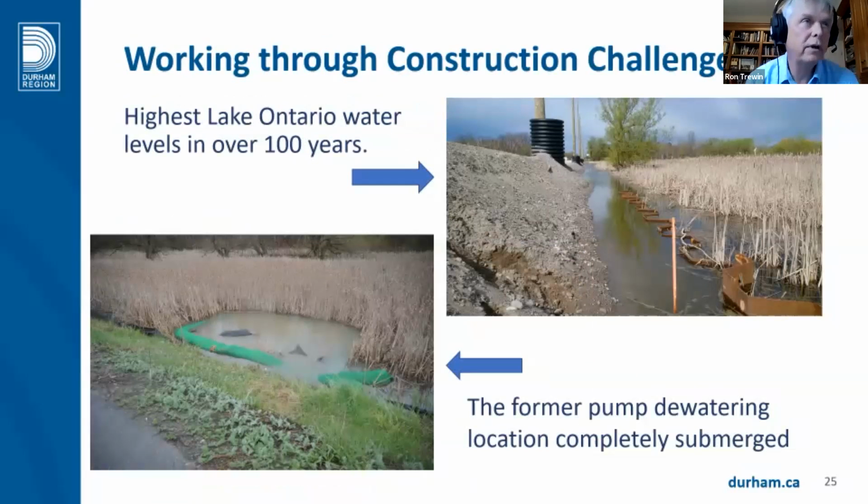Working through construction challenges. Here we had the highest Lake Ontario water levels in over 100 years. How could we predict that? Our former pumping dewatering location was completely submerged, so we had to move it. The dewatering area was totally flooded, so we had to construct another one further on dry land.